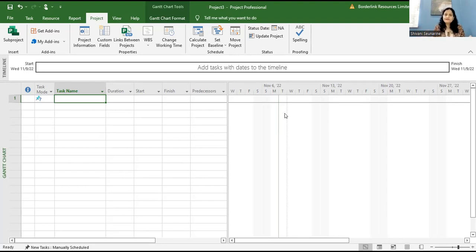So the point is, you have a deliverable and you have your tasks. You do not put the durations on your deliverable. You put the durations on your tasks, and then of course the deliverable will add it up and do it properly for us, because it's a scheduling tool. And already you are seeing, Catherine, if I do not know my tasks and my deliverables and I do not know the durations, this thing can't work, right?